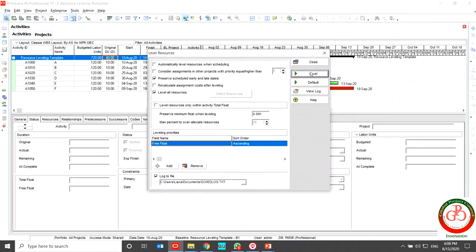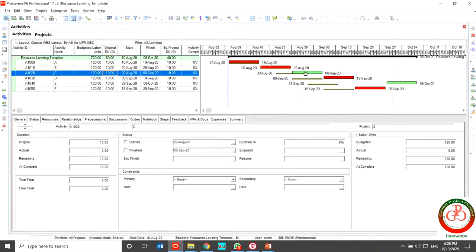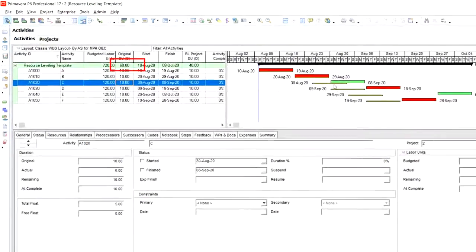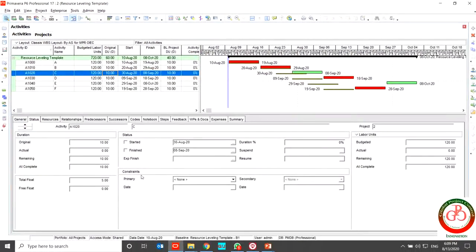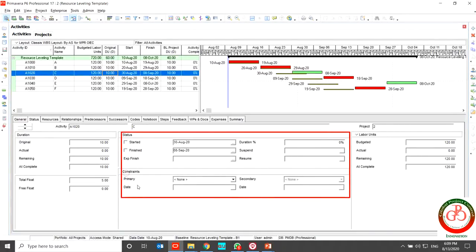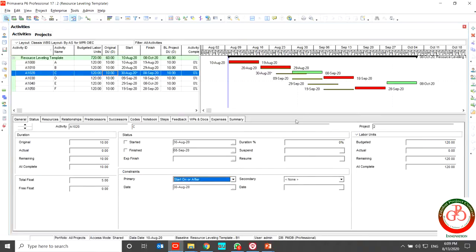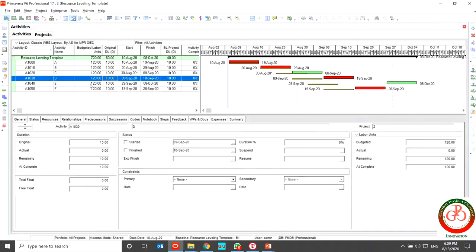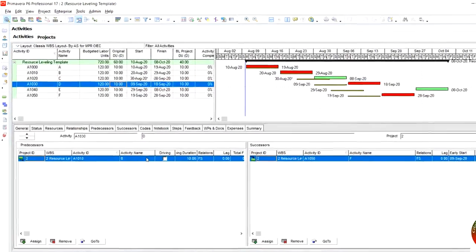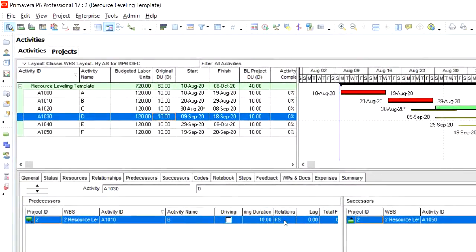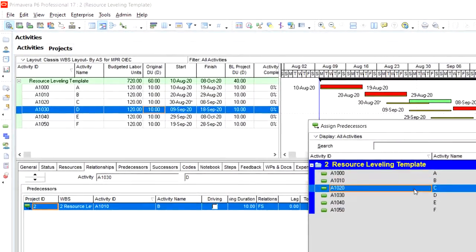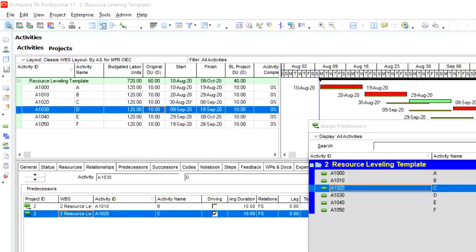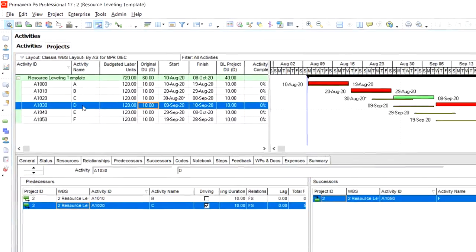But I use to level again. And in this situation you should use the solution first or second. I use selection first for activity C. I'm going to status constraint and in the primary constraint I use Start On Or After. What happened to activity D? Activity D have a relationship to activity B finish to start without any lag. But according to my leveling this activity need a new relationship for activity C. So I add another relationship to activity D.